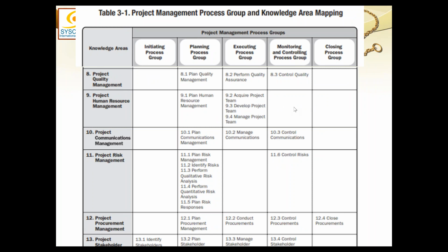Human resource does not have any process. This is the only knowledge area which does not have any process in monitoring and control. And I told you yesterday that is because everything to do with human beings, our resources, is done in execution. You acquire the people for the team, you develop and train them, you put them on the job and manage them. Once you manage them, there you deal with them. You don't deal with them in monitoring and control.